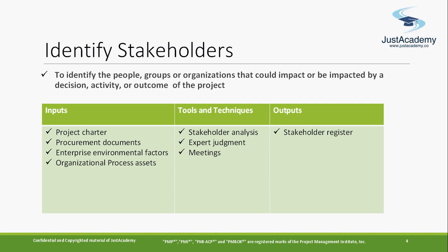During the initiating process, you know that these are the stakeholders who can be in my project. At a high level, you can see who the different vendors are, maybe the project team, the project sponsor, or who can be my customer. Now, once you have this stakeholder register at the initiation phase, you can start using it during planning or execution, right? That's where you need to plan it.